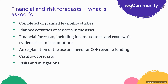The next part is financial risks and forecasts — this is the area of the management case that most people struggle with. What is asked for includes completed or planned feasibility studies, going back to basics about planned activities or services you'll deliver in the asset, financial forecasts including income sources and costs with an evidenced set of assumptions, an explanation of the use and need for community ownership revenue funding, three years of cash flow forecasts, and coverage of risks and mitigations.